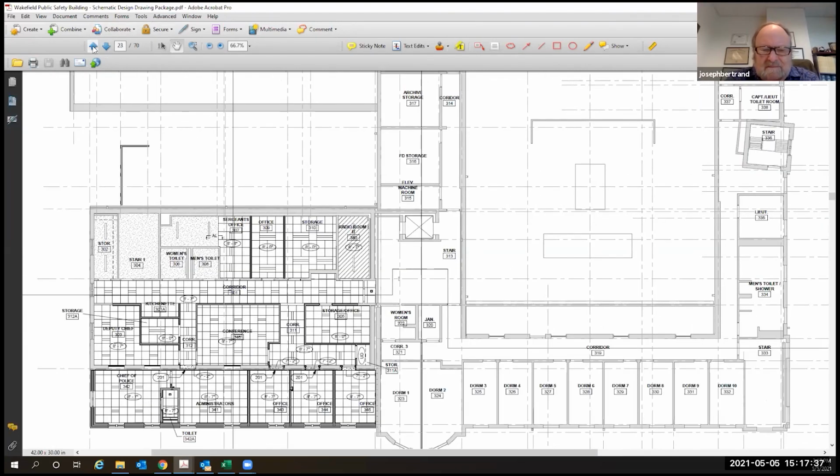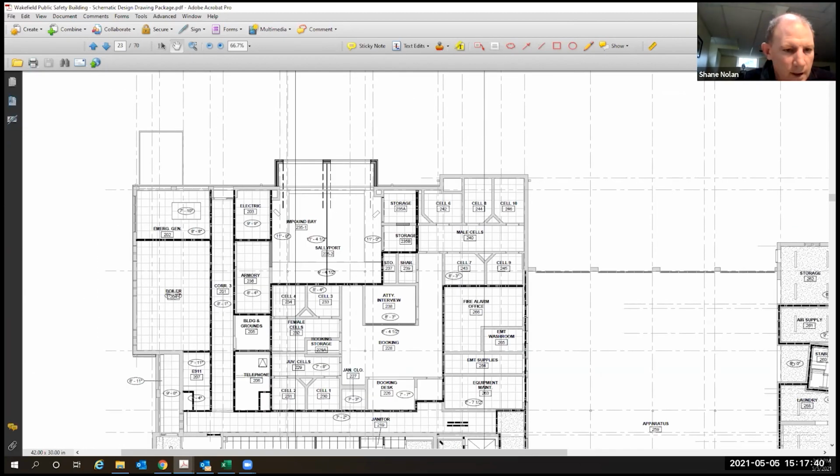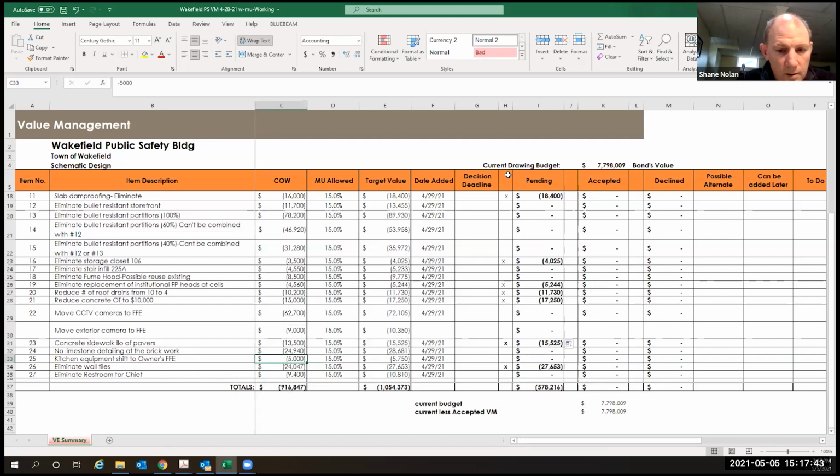Chief, do you guys need a dishwasher or an ice maker? We already have a dishwasher. We should be able to recycle anything that's in the kitchen. I'm just thinking if the owner buys the appliances, we need to coordinate any plumbing hookups. For a dishwasher, yes, and if you have an ice maker. Nothing else goes right with those, but the dishwasher, yes. So we'll pick up the dishwasher in FF&E, but Janet, we need to make sure the hookup is in plumbing.